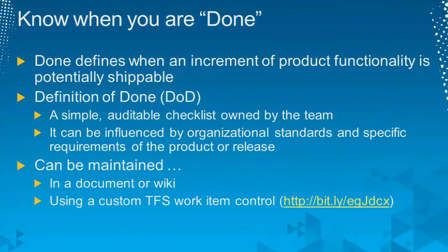The definition of done, DOD. This is somewhere else that teams can become flaccid. In addition to building that user story that says we want a Twitter feed on the homepage with those 5 acceptance criteria things, there are other organizational and product criteria that you've got to consider. Our corporate standard is C#, SQL Server. We like our homepage to have the Metro UI look, whatever. So our definition of done will include those kinds of overarching things, cross-cutting things. I hear that term a lot too.